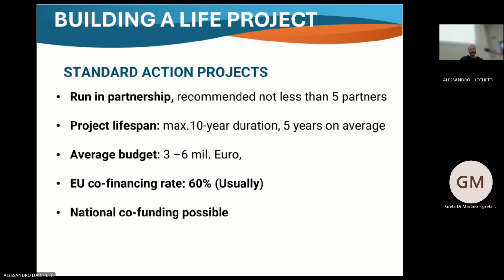And for the LIFE project, when you start making a new project, you have to think at the beginning of your partnership. In my point of view, minimum 5 partners, otherwise the project is too small. Now the approach is to have very big projects with very big budgets. And the duration,